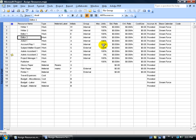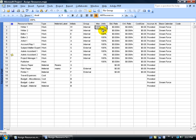That's what the default project calendar is, and that's what I have mine set up as. So for Writer 1, he's available 100% of the time, or 8 hours a day. If we go down to 50%, he's only available 4 hours out of a full 8-hour day. And then 75% would be 6 hours, and 2 hours would be 25%.